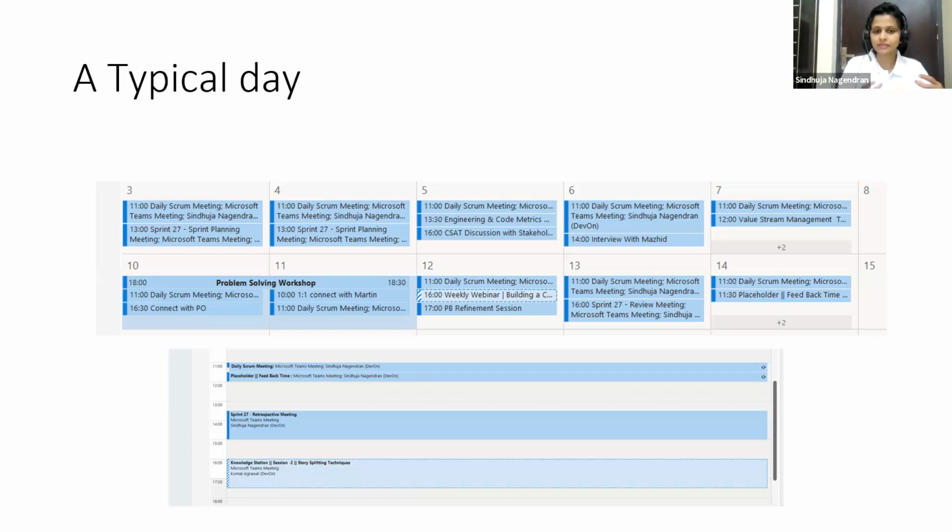The daily scrum is a scheduled and repetitive event that happens at the same time. We have planned it at 1 o'clock India time because we need to accommodate a few UK people and people from some other Western countries. So that is the reason we have it at 1 o'clock. The sprint planning meeting will start as per the team and the organization's working style. It may vary; one can finish within a day, or 2 or 3 days even. Based on the Scrum Guide, a sprint planning meeting can take up to 8 hours.